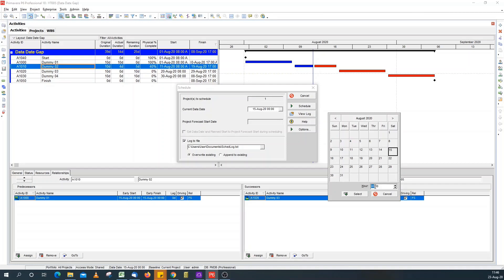If your calendar starts at 6 a.m., your data date should also go for 6 a.m. If your calendar starts at 10 a.m., your time also should show 10 a.m. In this case, my calendar starts at 8 a.m.